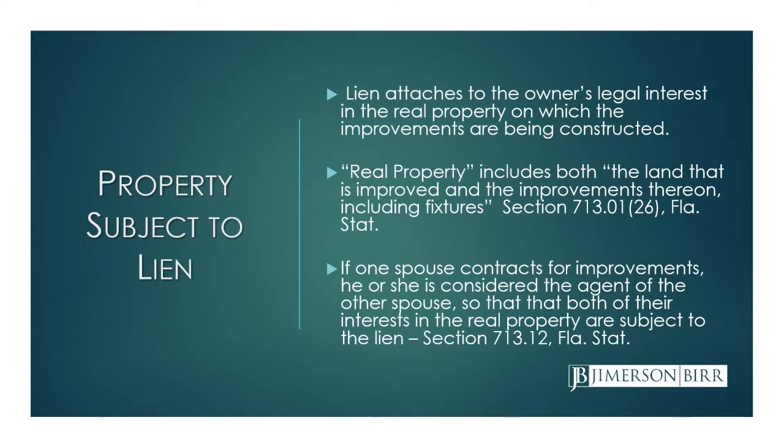And one nuance related to property subject to the lien: if a lienor has a contract with a spouse to do work on a residence, for example, and only one spouse, say the husband, signs the contract, the lien law says that just because the husband signed it, the wife is bound by the contract for purposes of the lien too, so as to protect lienors.